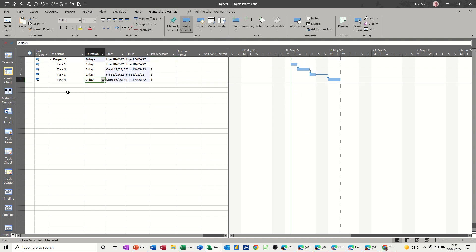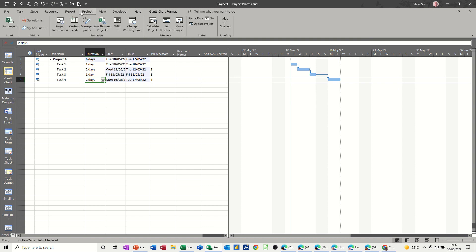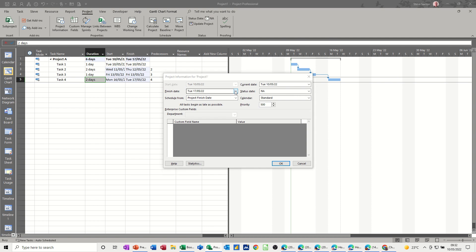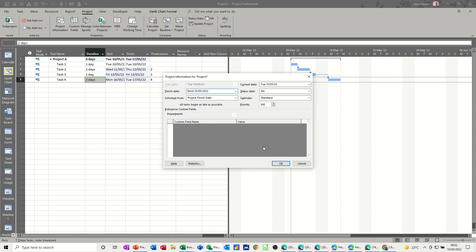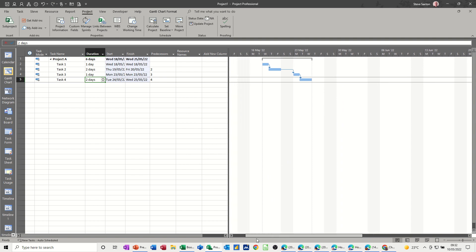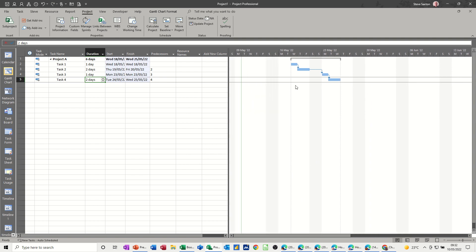If I put this project to a finish date, what will happen is whatever I set as a finish date, these will all pull forward. So I'll just do that in Project, and I'll change the finish date forward a little bit. So I'll go to the 25th of May, say, and then click OK. So they've all gone forward to the 25th of May because they're all linked.